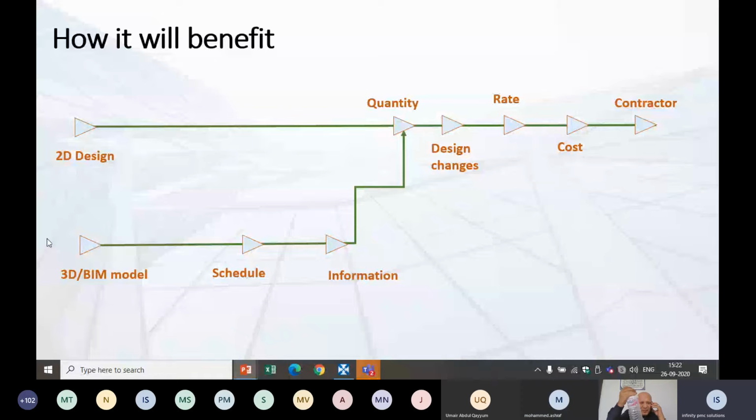The same way, when we have a BIM model, we can link our model element schedule. We can see the model element schedule, whatever elements we have, say column, beam, slab, in Costex, and add any additional information if required. Say you want to add vendor information to your BIM model, which your modeler can't do, but as a QS you need some vendor information to be linked to your model. That can be done here in Costex. That is what adding information to your BIM model means. And then the process goes on with the quantity takeoff.